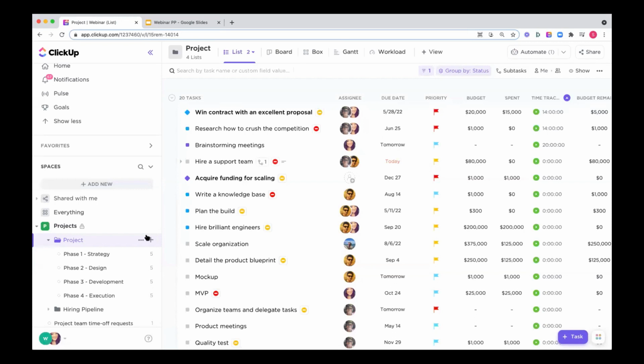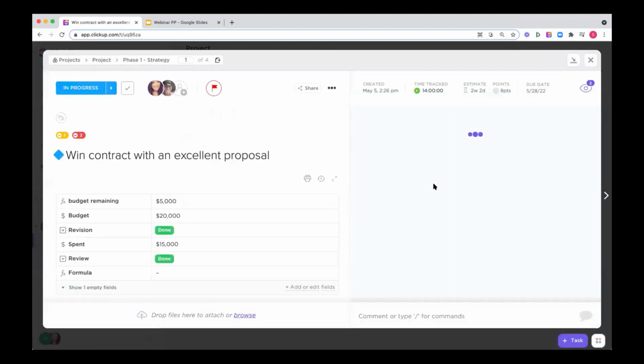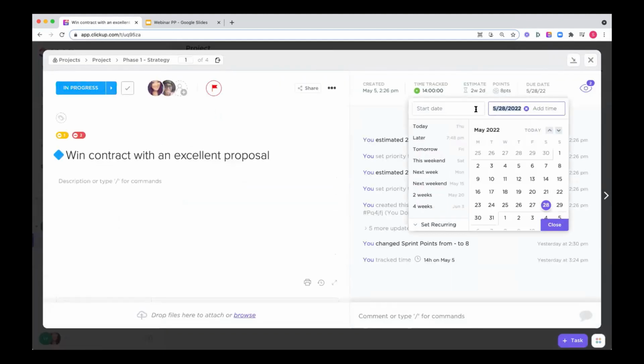Tice, you ask, can I split a task automatically when a vacation is taken in the middle of a task? You cannot split a task automatically. So let's say, this is a really long task. Maybe its start date is May 1st, and someone takes their vacation from the 11th to the 14th. You cannot say, I don't want any duration to be allocated for that person during those days.